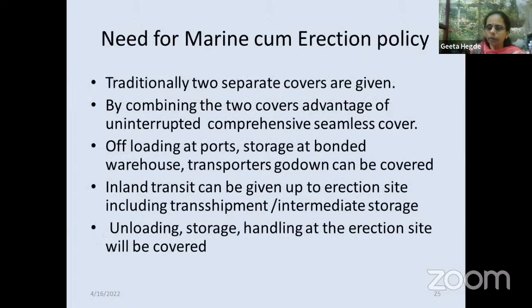Now, what we have seen is the erection policy. Erection policy can be either storage cum erection or marine cum erection. Traditionally, two separate covers are given. By combining the two covers, there is the advantage of uninterrupted, comprehensive, seamless cover. Offloading at ports or storage at bonded warehouse can be covered. Inland transit can be given up to the erection site, including transshipment or intermediate storage. Unloading, storage, handling at the erection site will be covered.